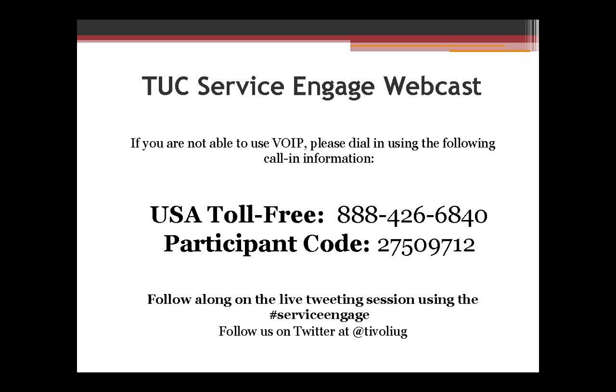But what you see some teams doing, like the Rational Jazz team who creates products like Team Concert, is not continuous deployment in the sense of 10 times a day updates, but more of a regular rhythm of deliveries focused on ease of deployment so that you don't need to take outages during deployment. Adrian Cho, one of the guys on the Webcast, works on the Service Engage team, but he helped Rational pioneer this. They used to deliver a product like Rational Team Concert once a year, big bang upgrade, turn off your source control for 12 hours. But now they deliver it once a quarter, and companies are able to consume the on-premise products on a quarterly basis, and I think that's a pretty good example. But where we really see the DevOps success is, once again, in the newer SaaS products.